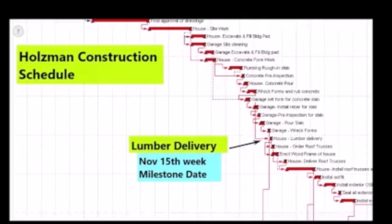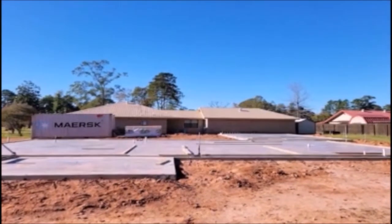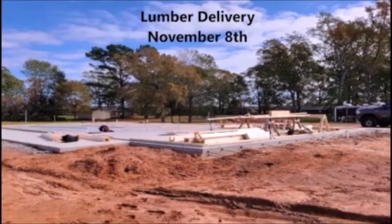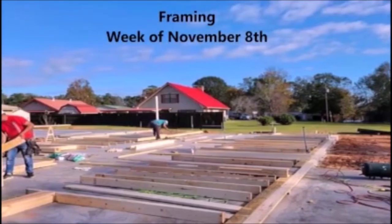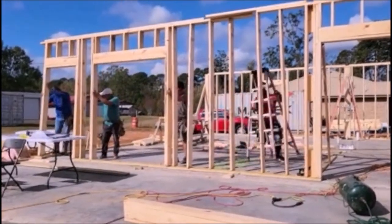The other milestone dates that we established at the beginning of the project were the lumber delivery — as you see here, November 15th was a milestone date. And then our roof truss deliveries was November 25th. But since we were a week ahead of time, we had to reestablish those milestone dates and get with our lumber company and our truss company to deliver them one week earlier. We delivered lumber on November 8th, started framing on November 8th, and we were a week ahead of schedule at that point.